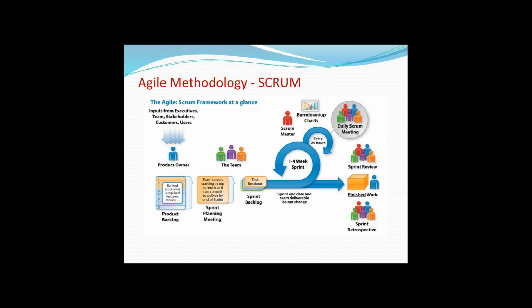The first part will be designing the user interface and designing the database. And the second phase would be writing the code in the application, so that once you click the submit button on the registration page, it calls the actual application and the code goes and stores the user details in the database. Like that, the stories will be split into two.